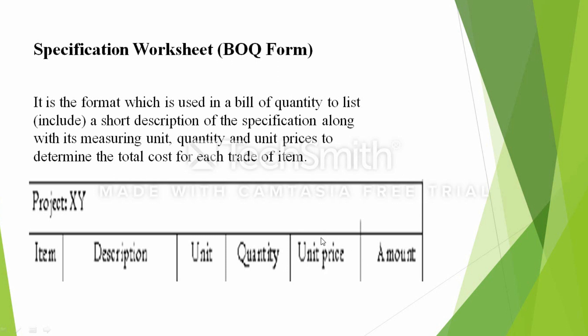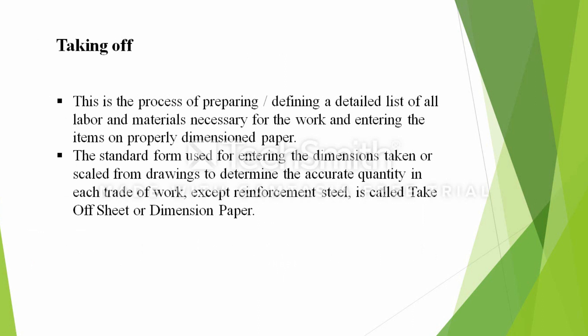This is a price per meter cube. In this example, the excavation is 1.3 per meter cube. At the beginning, the amount equals unit price times quantity. The result is 1.2. So the bill of quantity will describe the format.